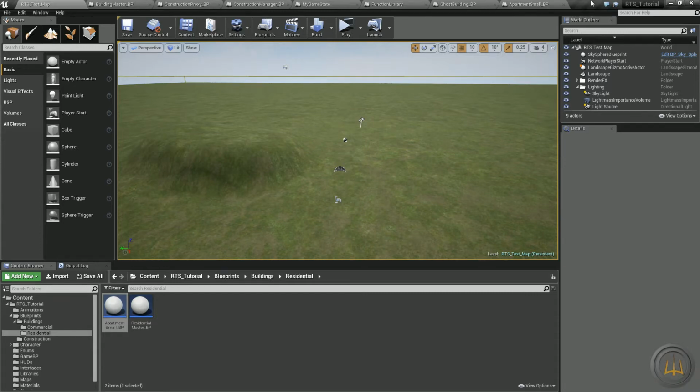You know, you get this grandiose idea of a game, and you're all excited, and then you sit down and you start to do it, and all of a sudden you just feel overwhelmed. So get your broad scope of the game, write it down. Then you take those bits and pieces of what you think is required to make that game, and you make separate lists out of those. And then you list the things that each one of those need. And then you prioritize in that sub list of what is the most logical step.